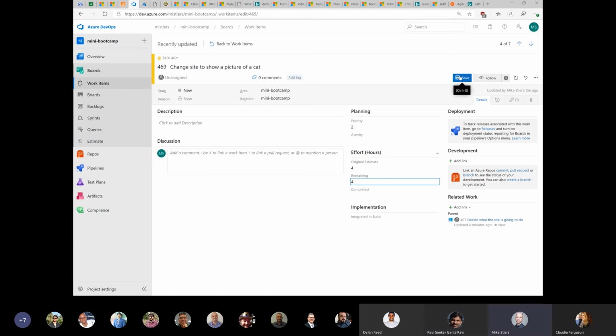Yeah, that's a good question. So you have to change both because, unless there is a way that I'm not aware of, it seems that you have to kind of calculate this on your own. So the question is, if I was working on a specific task and I had to change the site to show a picture of a cat and I already spent 2 hours on it, if I hit 2 here and I estimated 4, is it going to adjust? No, because I think the idea behind it is you're estimating. So you're not going to be exact all the time. So the way I do it anyway is I go back in here and I say, now there's 2 hours remaining.